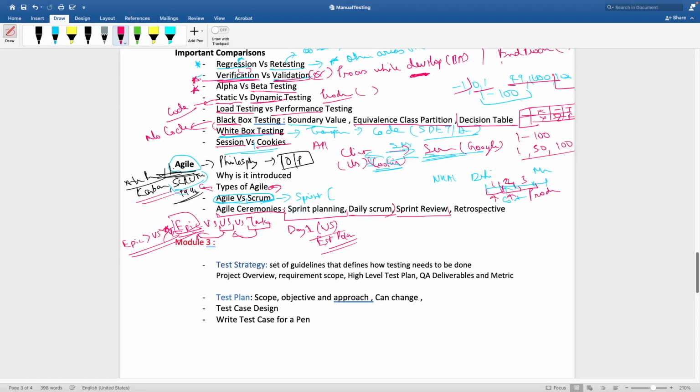After that, there's a sprint review, in which we see what all we have done, and whether there is any part of the product which we can ship. And after that, we do a retrospective, in which, as the name suggests, we see what we have done well and what we can improve. Okay, not actually blockers, but what we can improve, and this is generally run by the scrum master. Okay, so this is it.